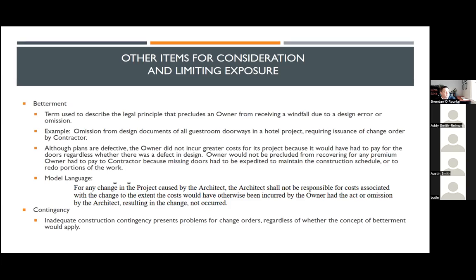Oftentimes, claims are made based on a lot of costs that should be borne by the owner. So to get out in front of it with your contract and to address the term betterment, I think is helpful. And I've included some model language there. If there's an increase in cost to get these doors to the project site on a more expedited time schedule, or to remove work that had already been installed to install the doors, then you might be on the hook as a design professional for that as a result of your omission, but not the purchase price of the 400 doors themselves.